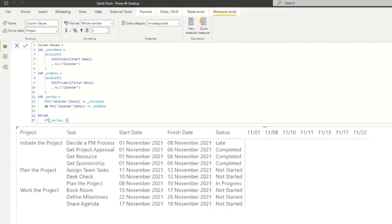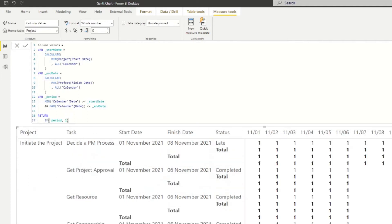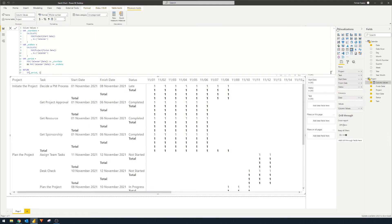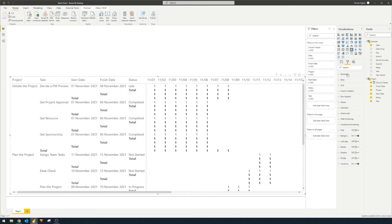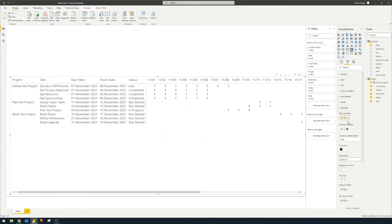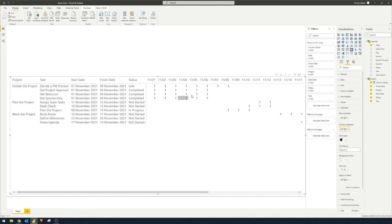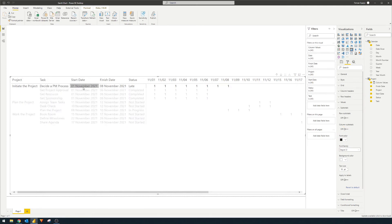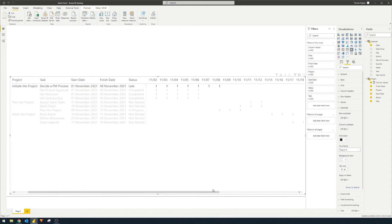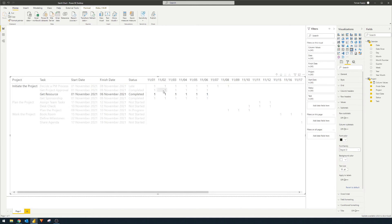And let's add this into our value as well. So here we kind of have to fix a couple of things. So we have a couple of subtotals that I don't want to see. So we'll just disable those. So here we go. So you'll see that now we are using that period to mark the dates where the start dates and finish dates are for each of those tasks. So for example, if you look at this one, you see the 1st of November to the 8th of November. That is where the ones are. And then where there aren't any ones, it's blank, because we decide that on the if statement. So same thing with this other one. So first to the sixth, that's what it's being highlighted, or you have the one value on those columns.